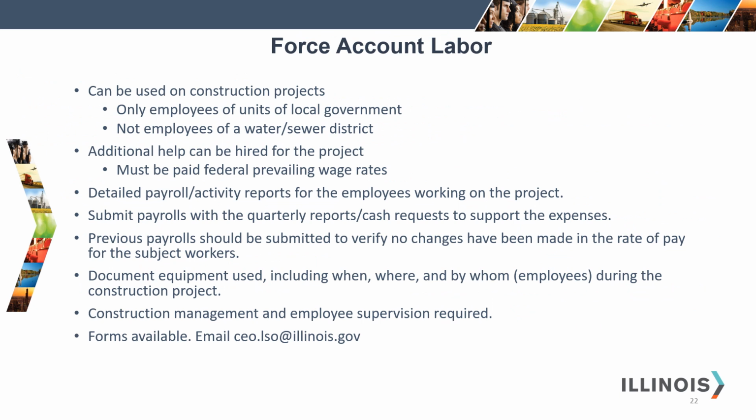Okay, I'm going to briefly cover forced account labor. Forced account labor can be used on construction projects for the units of local government. It does not apply to employees of a water or sewer district. The grantee can hire additional help for the project, but those employees must be paid the federal prevailing wage.